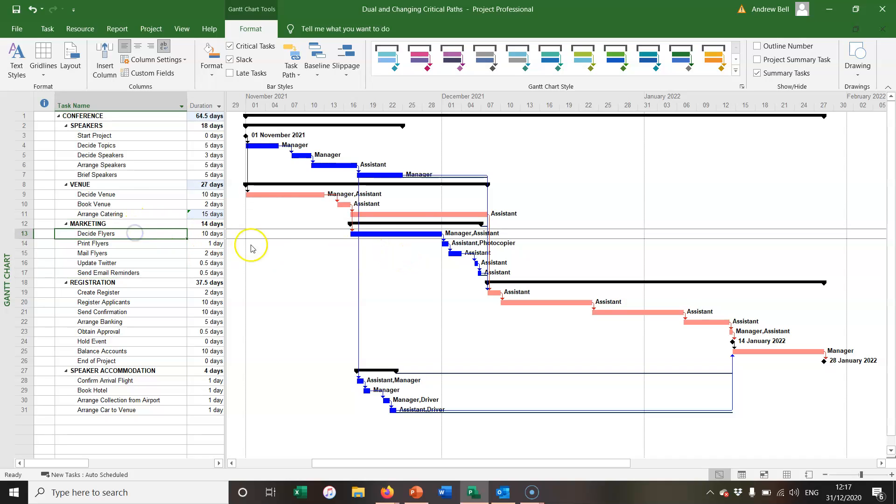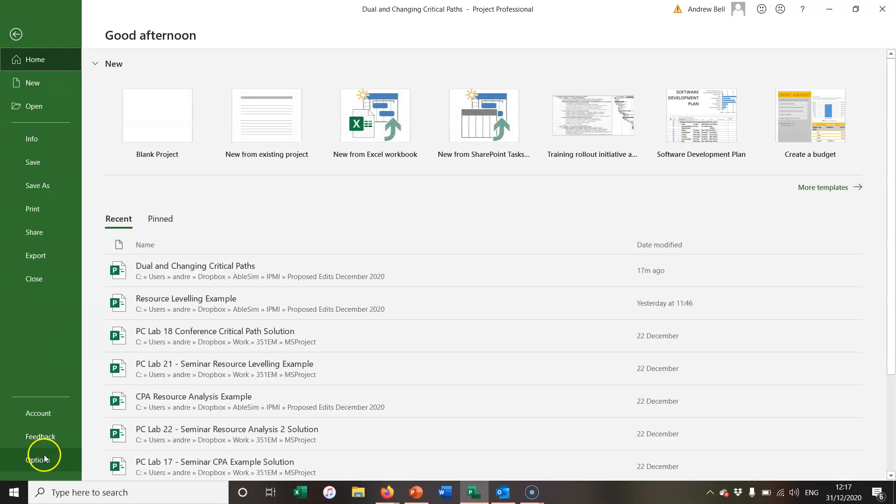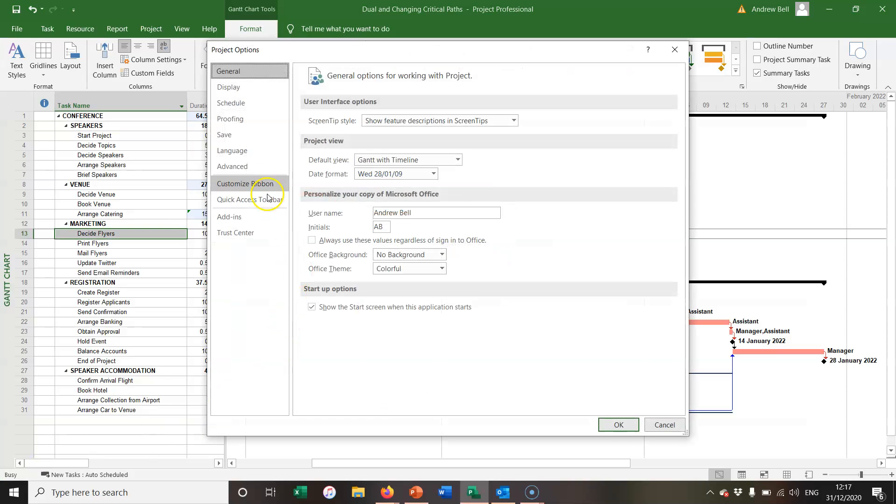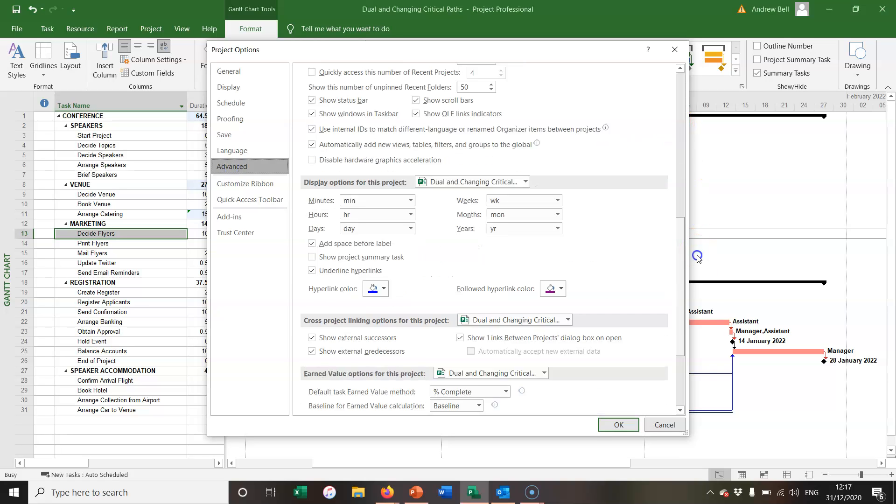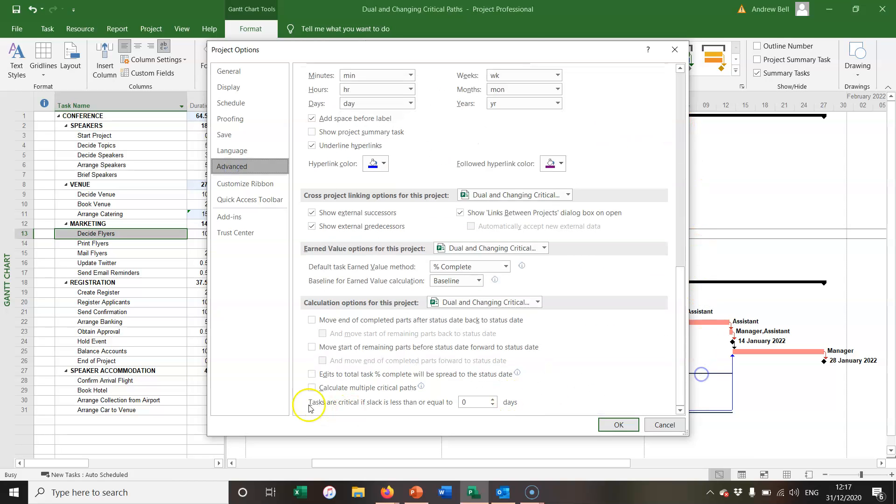Now Microsoft Project gives us that opportunity on the File Options, Advanced tab, and right at the bottom it says tasks are critical if the slack is less than or equal to so many days.